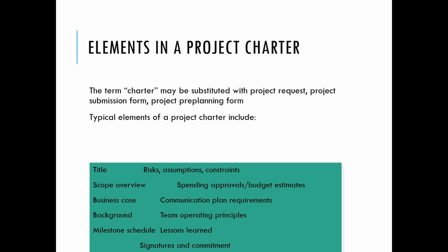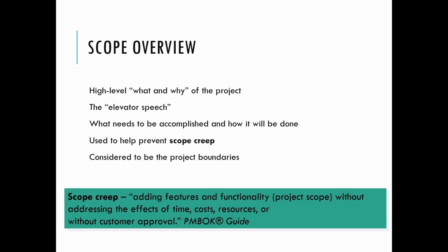In different projects, the term project charter may be substituted with different terms like project request, project submission form, or project pre-planning form, etc. A project charter is a high level what and why of the project. It's an elevator speech: what needs to be accomplished and how it will be done. It's used to help prevent scope creep. It is considered to be the project boundaries. Scope creep is a phenomenon of adding features and functionality without addressing the effect of time, cost, or resources, and without a customer's approval.